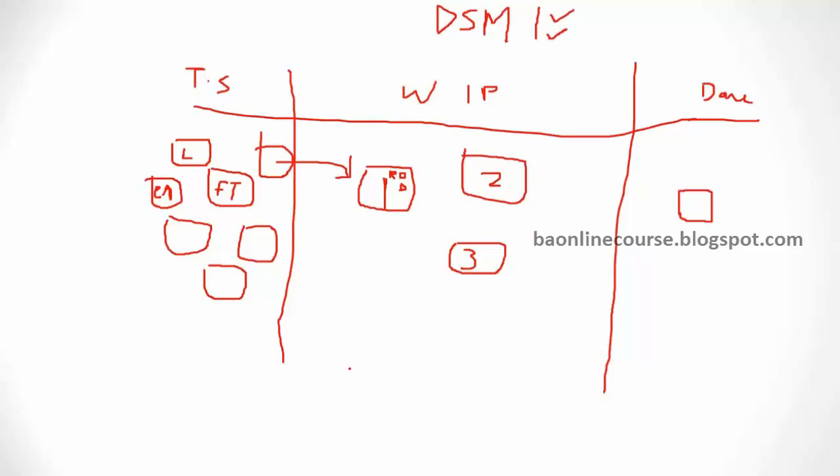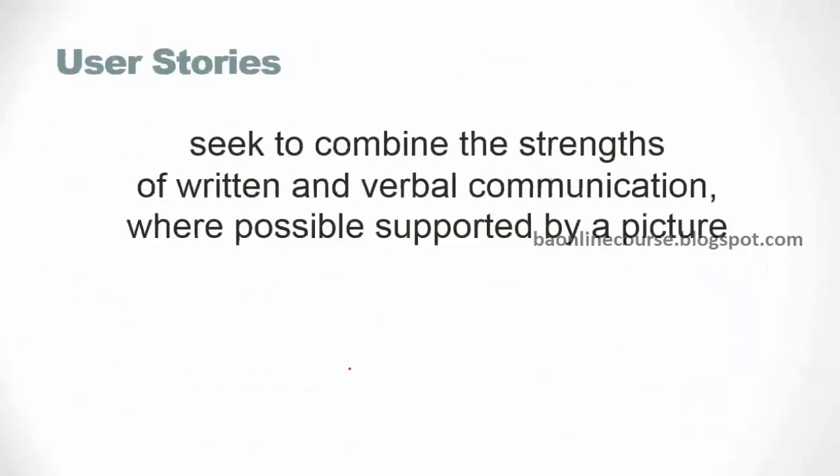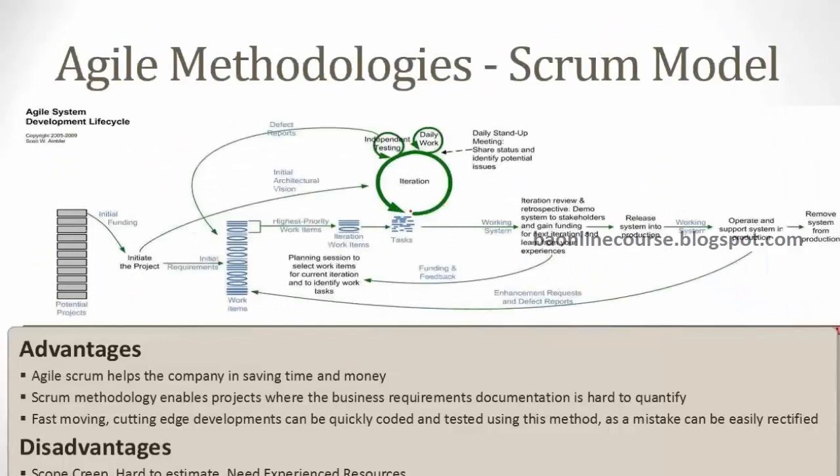Okay, so that's the second step, where we are executing a sprint. This iteration is called a sprint. Once we identify those features, they go through this sprint, where you do the design, development, testing, everything. You have daily stand-up meetings, where you figure out what every person is going to do and then deliver it. By the time the sprint is completed, you have all those features which are part of that sprint developed, and then you'll have a demo session.